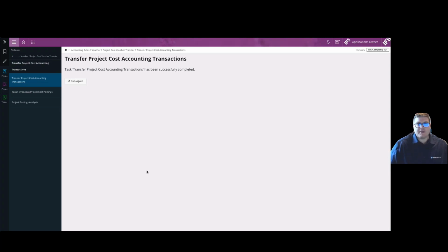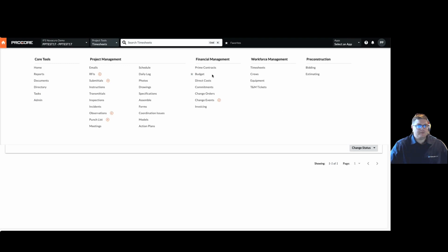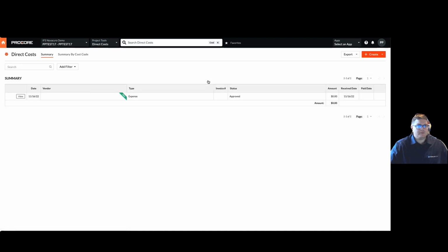So now what's happening is messages are being fired off from IFS to Procore. Novacura is going to go ahead and create direct costs to capture the total cost on the project. If I go back to Procore and go to my direct cost screen, you'll note here that I have an expense line. Well, that expense line has a 0 amount, but it's only because the cost transactions within IFS had the same.